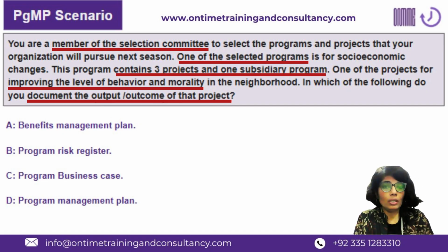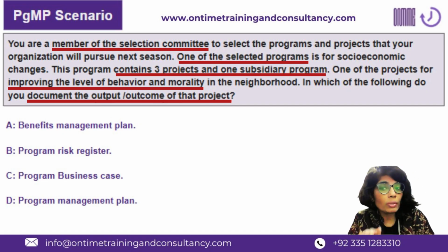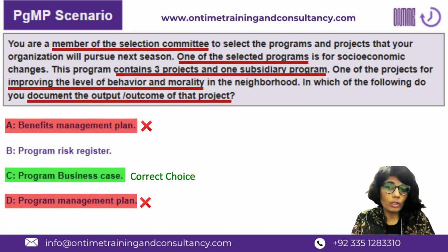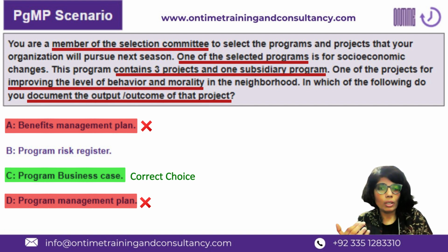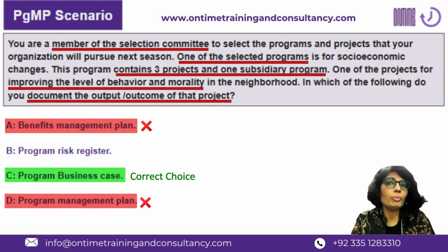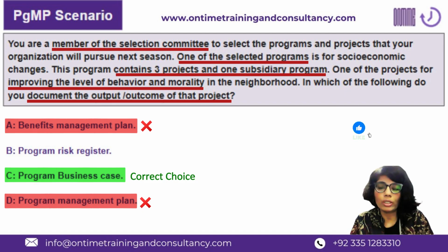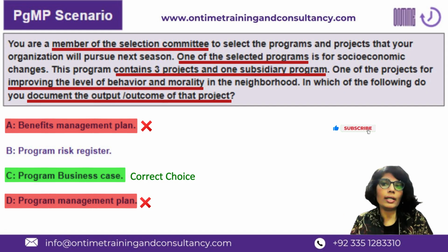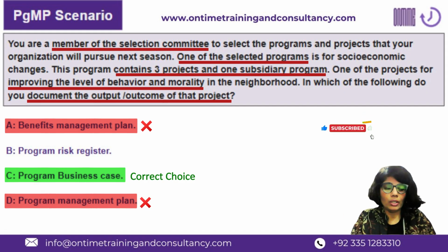So this is how we see it. The correct answer to this question is business case, not benefits management plan. And not program management plan, because the benefits management plan is a component of the program management plan, and both of those are ideally created and baselined in the planning phase. Yes, you can have a high-level version of these artifacts in the formulation phase as well, but at least not before the charter. This is for sure: first the charter is created, and then the other artifacts for planning are created.